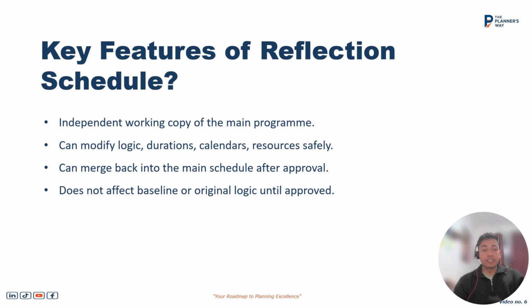Otherwise, it is similar to a copy of a main program. Likewise, we can modify any logic, duration, calendar. It works as a main program. We can change any logic, durations, calendars, or the resources and units without impacting the source copy, to see different scenarios. It does not affect any baseline or the original logic until we have the program approved, because we are just playing around in a copy of a program.